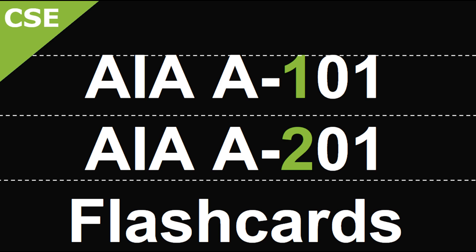What is the A201 contract? The general conditions of the contract for construction. What are the sections in the A201? The A201 is made up of: general provisions, owner, contractor, architect, subcontractor, construction by owner or separate subcontractor, changes in work, time, payments and completion, protection of persons and property, insurance and bonds, uncovering or correction of work, termination, and claims and disputes.